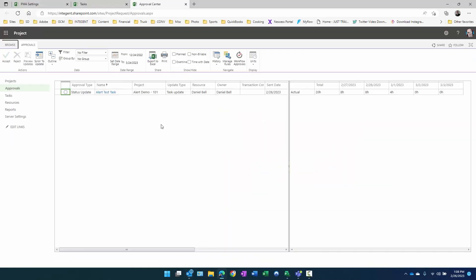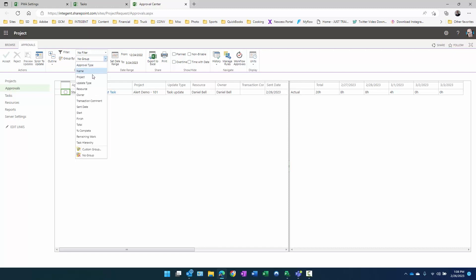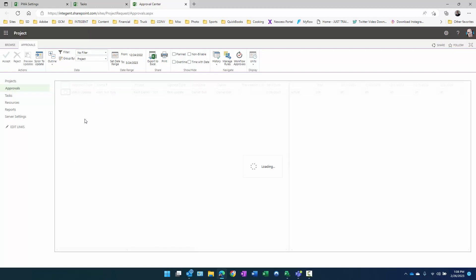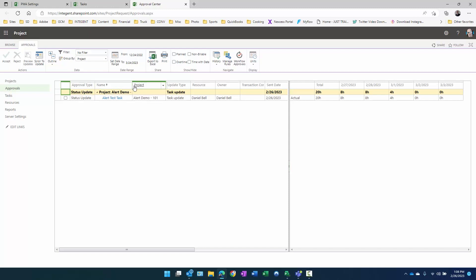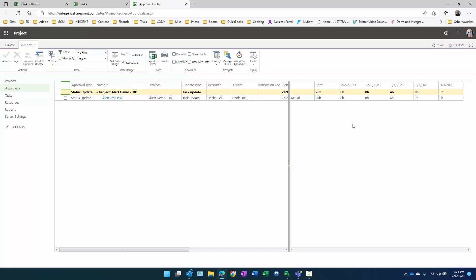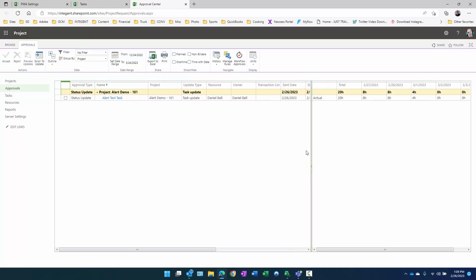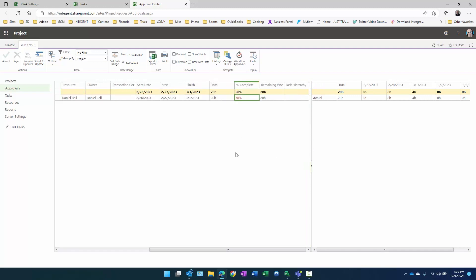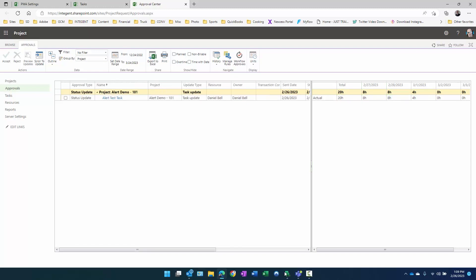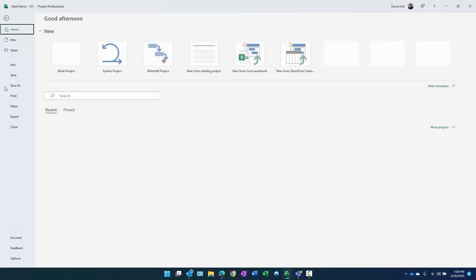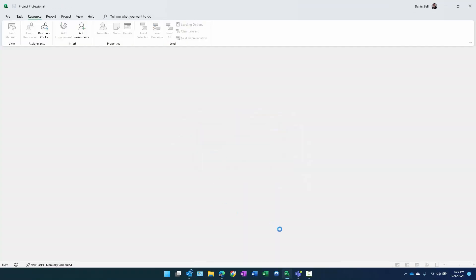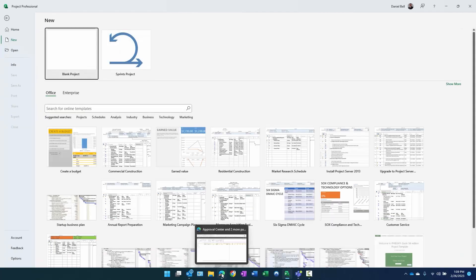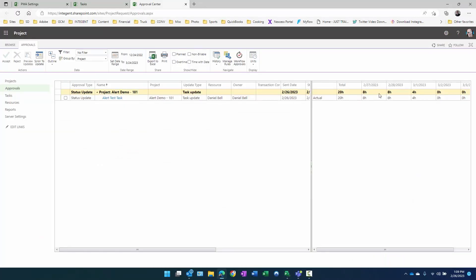If I click on the link here, the approvals takes me right to where the approvals are. I do usually like to group this by project. And that way, when I come in here, I can see each project and then all the updates contained within. So again, it's the alert demo project here. We'll go ahead and turn that out. Usually what you see here is you can look for items in red that were changed by the team member. That was changed by the team member to 50%. This was changed, yes, but it was changed as a result of the calculation based on the change by the team member. So what I'm going to do is exit out of the project. Do we want to check it in? Yes. Exit out of the project. I like what I see. 50% complete. Everything looks good. We'll click accept. Go ahead and click okay.